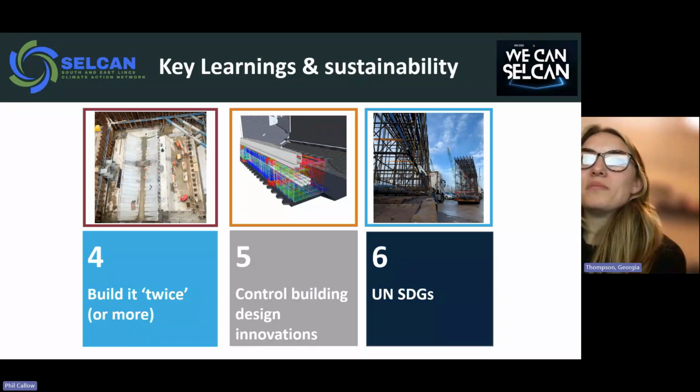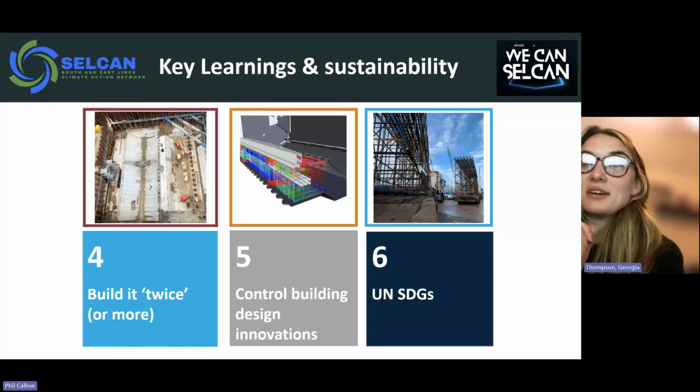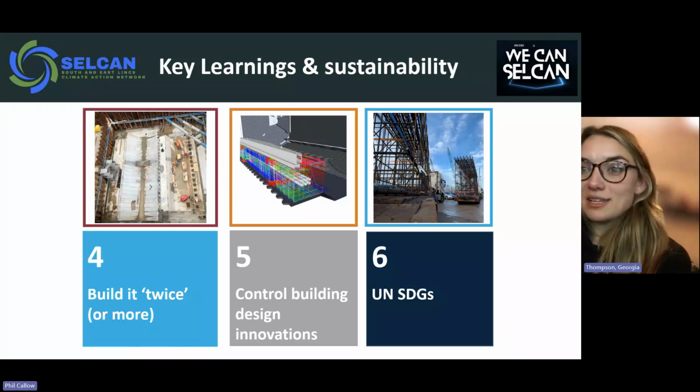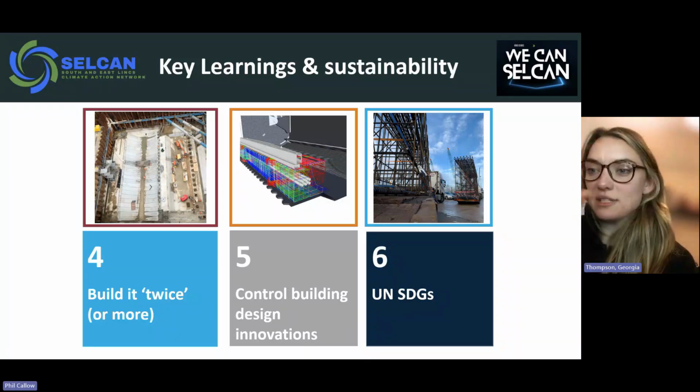Within those components, when we ordered those prefabricated rebar cages, it cut that installation process down to 2 weeks when it could have been 2 months, basically. So again, it improved the health, safety and well-being aspects on site, and saved 7 weeks in total, all of that together, off the programme's critical path. So this really shows what underpins the whole of the project.